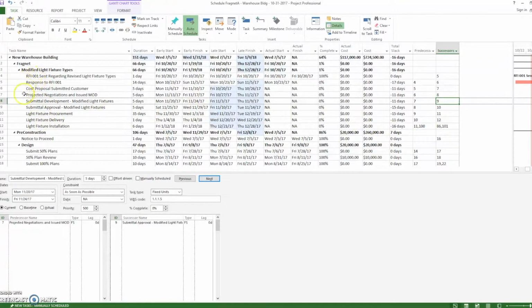So, what this will tell the client or the user is that if they decide to make this change, we will be entitled to an additional 16 days of time to be added on to the contract. With these 16 days, depending on if that previous negative 14 days was the customer's liability or the contractor's liability, we'll be entitled to either the 16 days or 2 days. And again, this is kind of negotiable at this point.